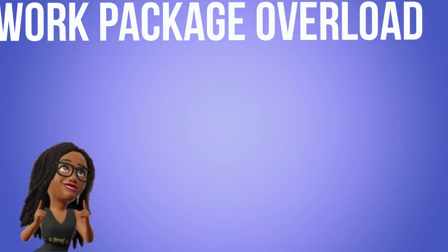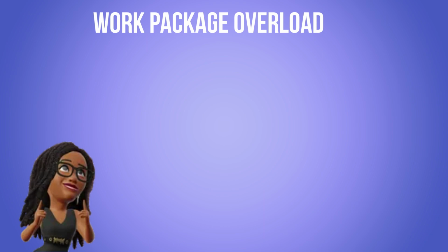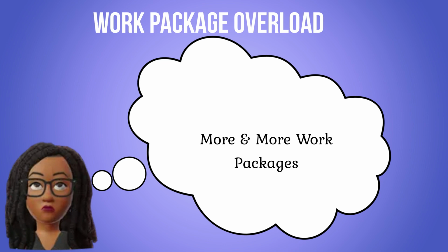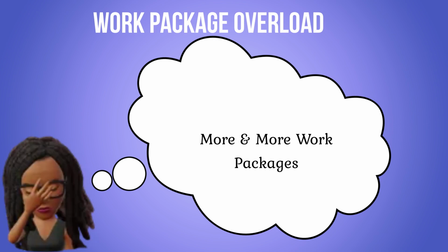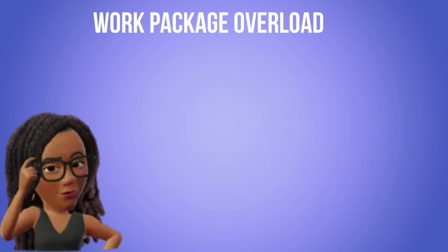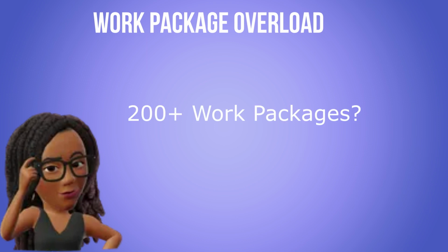Telltale sign number 4, work package overload. As the size of the WBS increases, so does the complexity of the project. The more moving pieces there are for a single project manager to oversee, the greater the opportunity for things to go wrong, and the lower the probability of completing the project successfully. As best practice, any project with more than 200 work packages should be considered for reorganization.